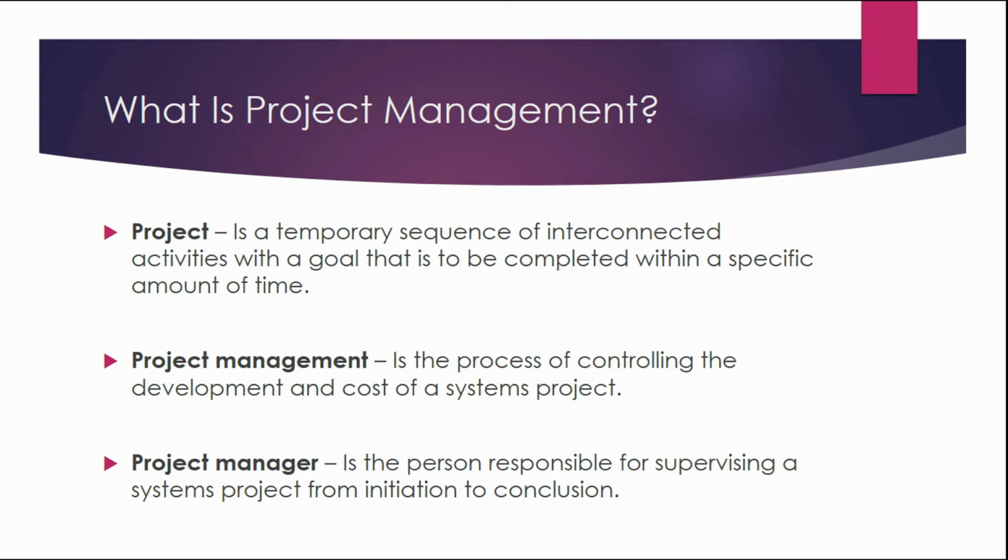These three variables are scope, schedule, and resources/budget. If you consider these three variables to be connected as vertices of a triangle, then one variable cannot change without affecting the other two. This is a key concept in expectations management.